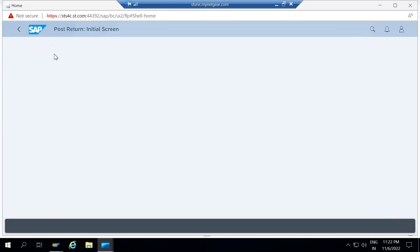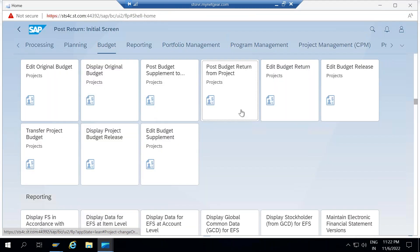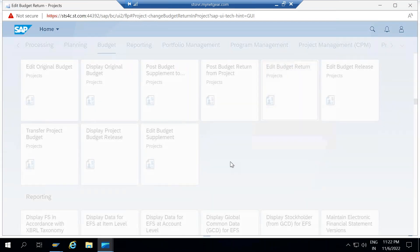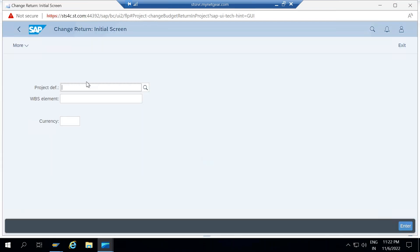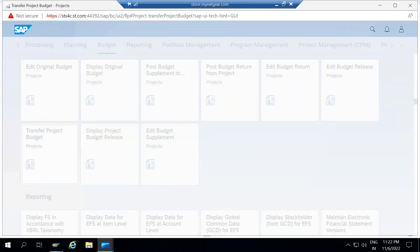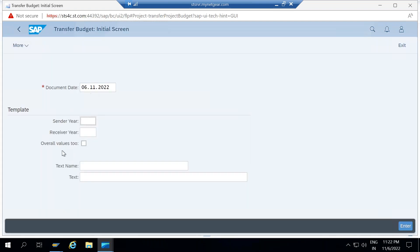In the Fiori apps, Edit Budget Return corresponds to CJ38, and Budget Release Transfer Project to Budget corresponds to CJ34. We can use these different apps for all these operations.